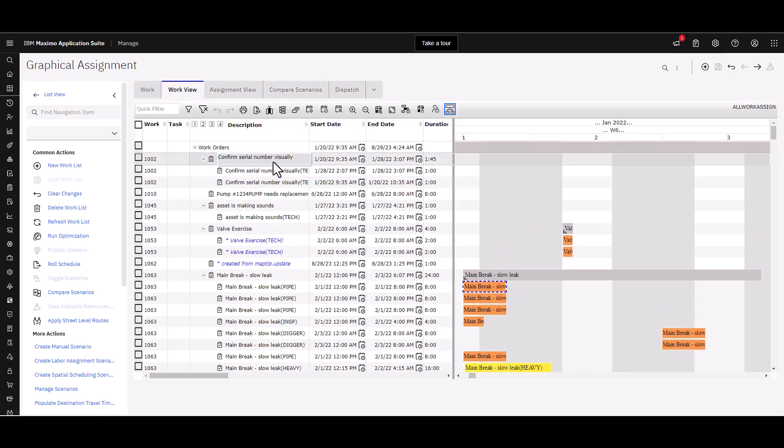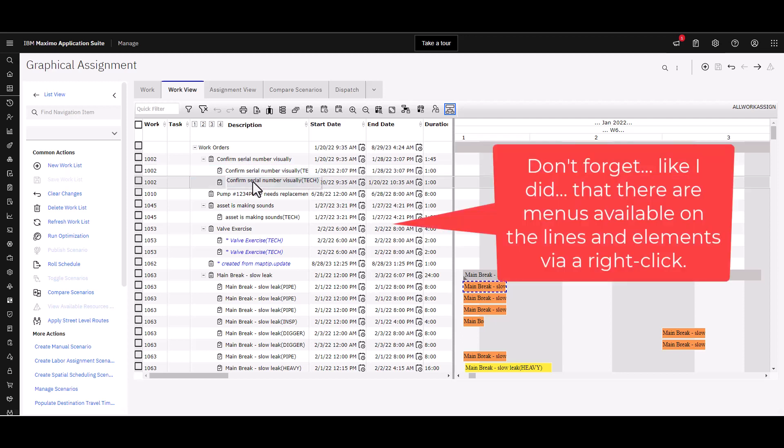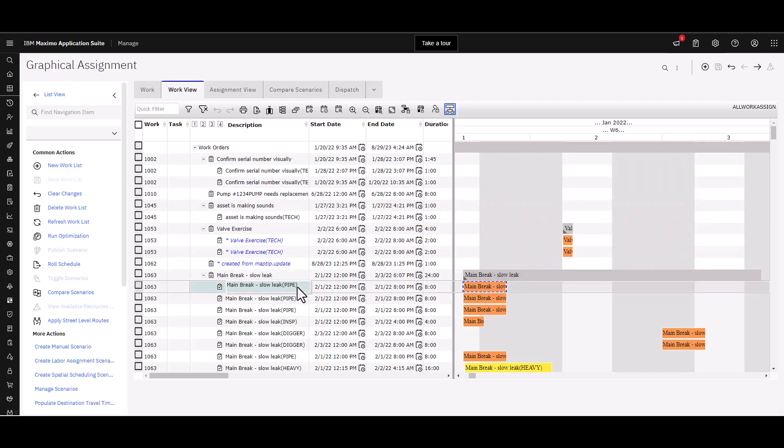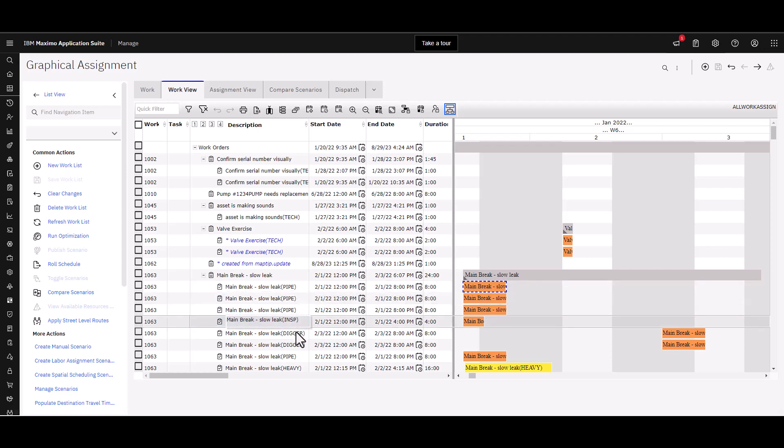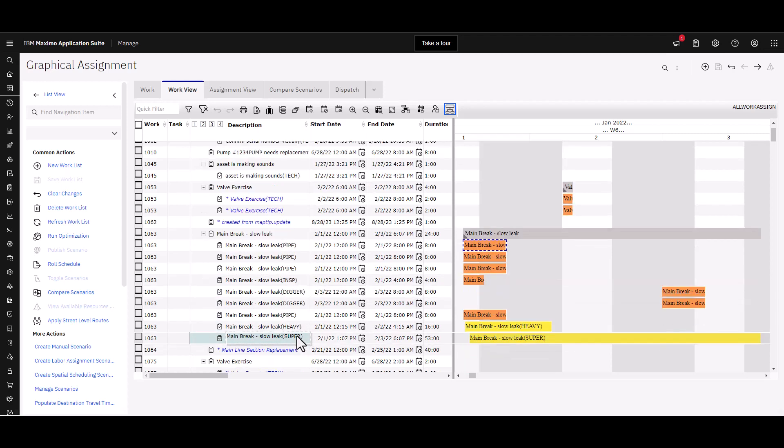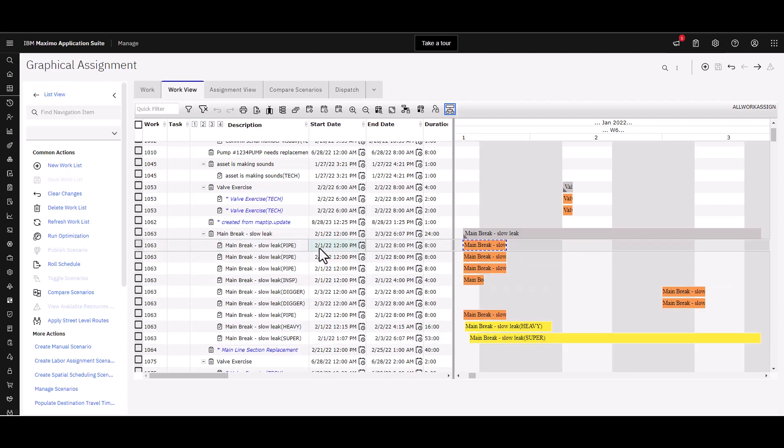Back to the work view here. You can see we have a list of not only the work order descriptions but under each one, these are the assignments that need to be made or have been made, whether you're at a crew level, a craft level, or even an individual labor level. If you look down here in this one particular work order on main break, you'll notice that I have a need to assign pipe fitters, an inspector, a digger, and other crafts as well, even a supervisor.